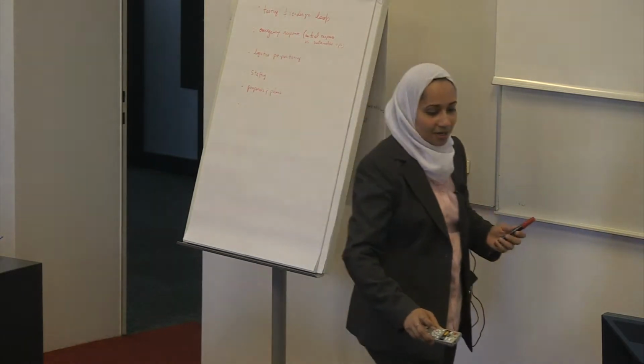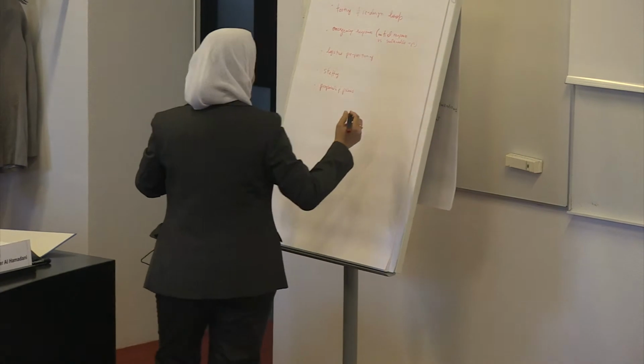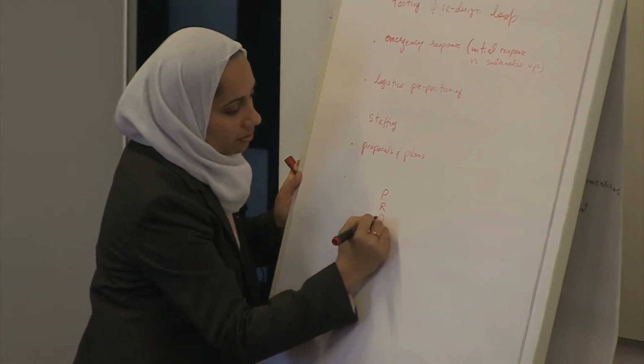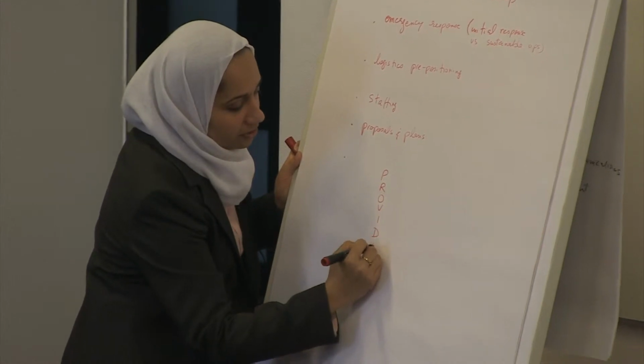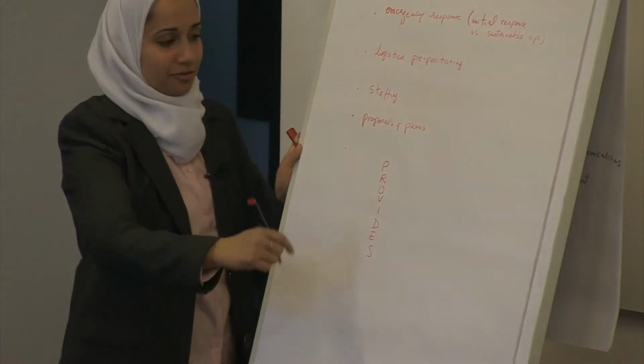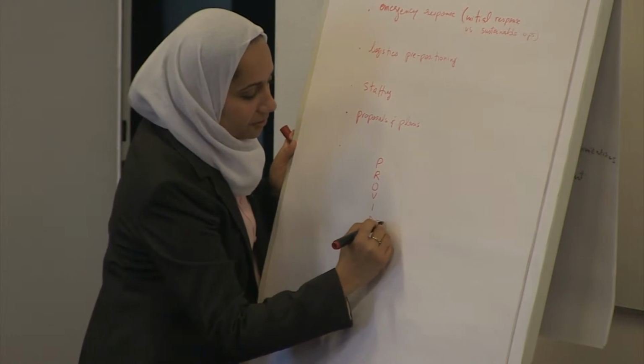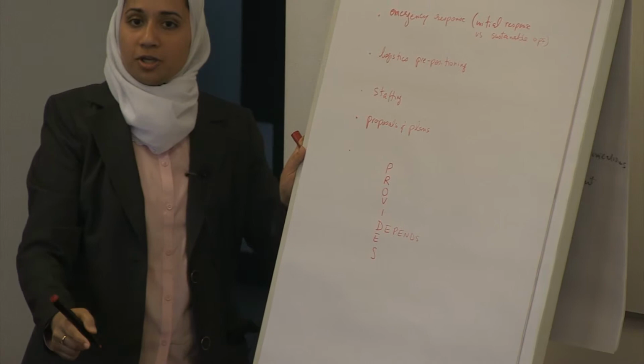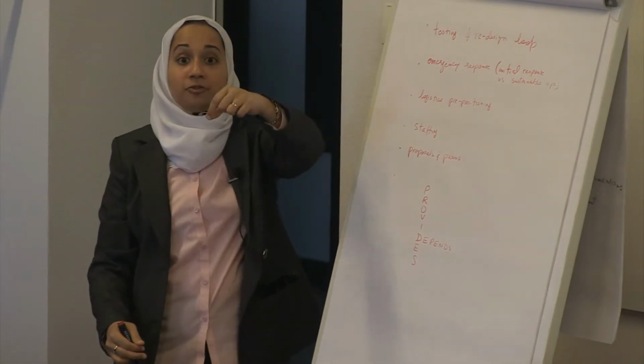Okay, so an easy way to remember the directionality, or how the convention is: provides goes down, okay, and this is depends. So if you look down a column, you'll know what that element is providing to.